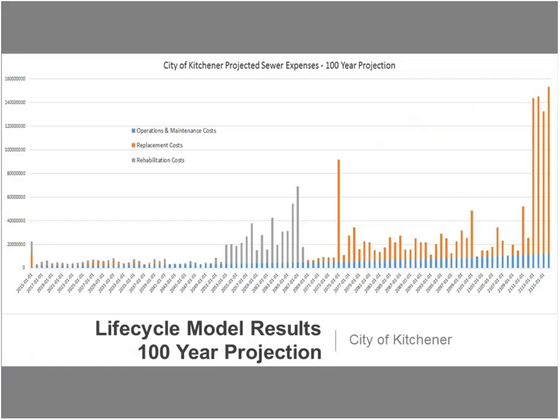Another life cycle model that we had built is with the City of Kitchener. In this case, this is their sewer life cycle model. The City of Kitchener had also included a rehabilitation event when the sewers hit a specific condition rating. In this case, a sewer relining, which improves the condition of the asset and would extend the asset by another 60 years, therefore deferring the full replacement of the asset well into the future.